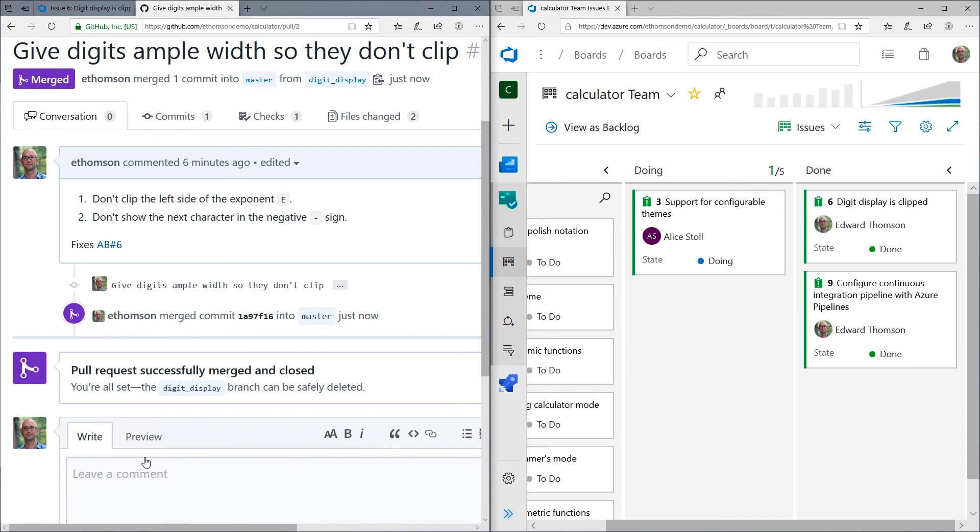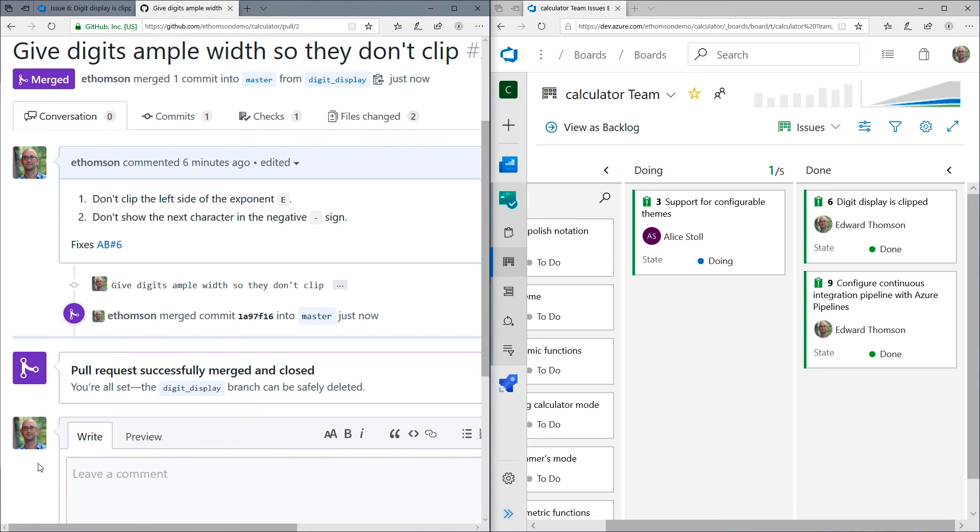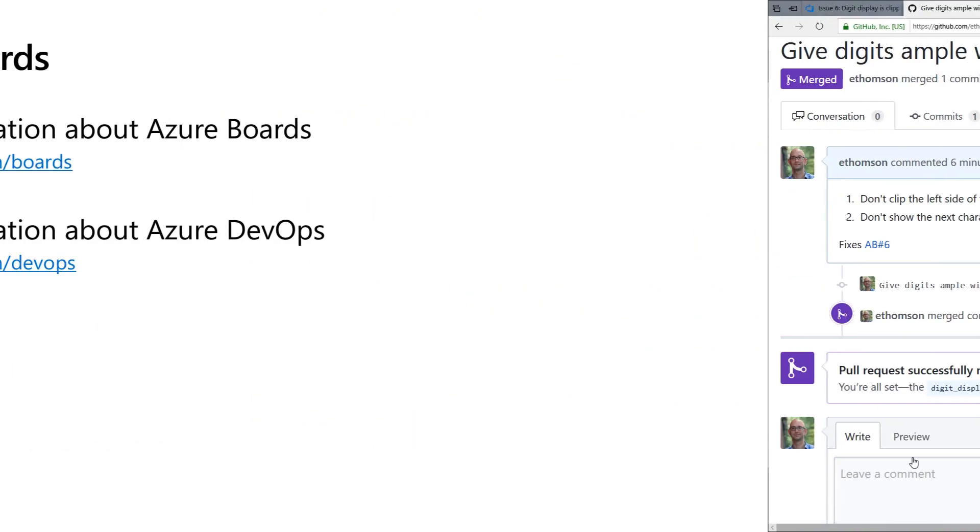So Azure boards is listening for these webhooks that it configured in GitHub. And since we used that smart mention that said fixes AB number six, when Azure boards was notified of that change, it knew that since the work item was fixed, it could move it out of the doing column and into the done column. And it does that automatically. So you're able to get this really tight integration between GitHub and Azure boards.